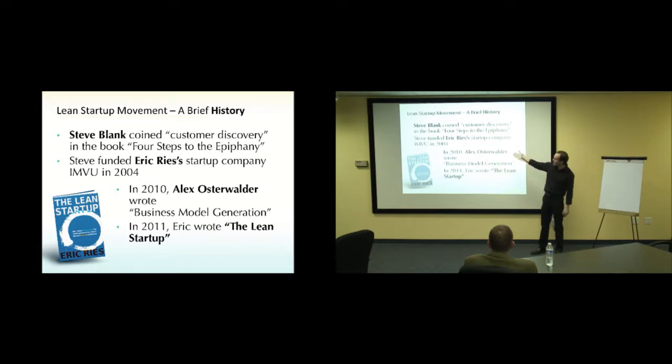And then you've got this guy named Alex Osterwalder, he came up with something called a business model canvas, which fundamentally is like a project charter. It's a one-page overview of, hey, here's what we want to do with the project. But it's a dynamic project charter, unlike a business case where you say, we're going to build this and 10 million people sign up next month. We're really saying, you know, that's a guess. They may or may not, in fact, sign up next month. So let's put it out there as a guess, and let's amend it as time goes forward. Let's assume it's a hypothesis, and then go forward and adapt that hypothesis as we build things and learn more.